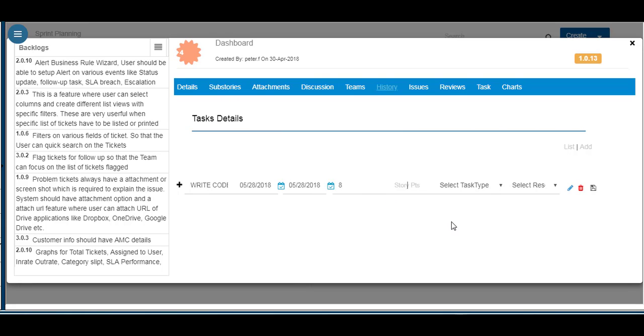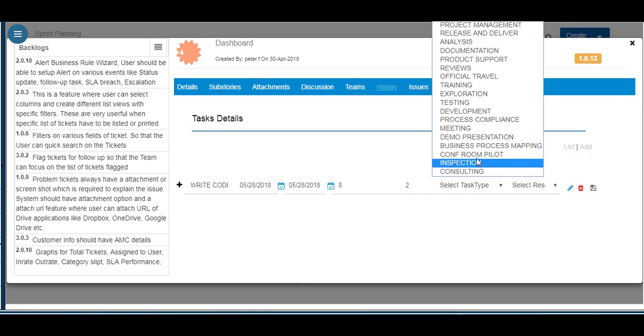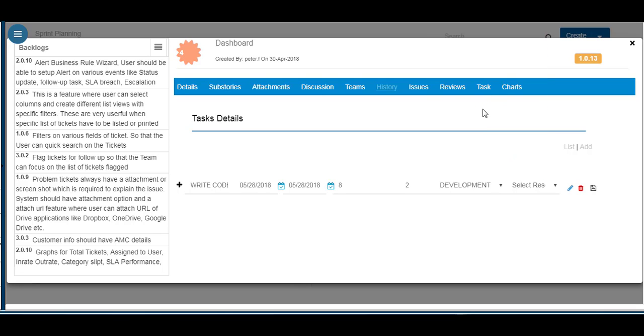The team logs actual time for these tasks in the timesheet and updates the daily progress. Updates on these tasks are used to derive the Burndown chart and sprint backlog that is used for tracking.